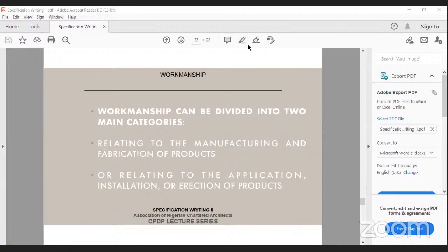It's not enough for you to know about the material. You need to know the components of the material and the application. So you are not the person who is doing the installation, but you need to understand the process of how the installation goes. That will help you know the direction the budget of your project is going. And that's why a lot of times in Nigeria, we tend to have cost overrun in our projects, because sometimes we haven't grasped how problematic installation is.